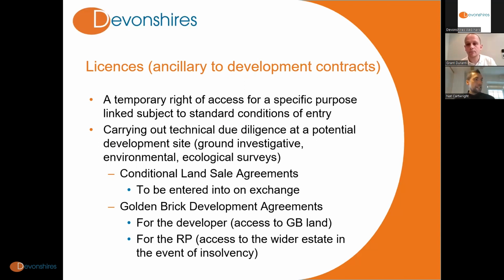So these can also be very useful legal instruments, ancillary to an underlying contract, whether that's a development agreement or an agreement for sale. Essentially, it will grant a temporary right of access for a specific purpose, and there will be standard conditions of entry attached to the license, which we'll cover a bit later on.